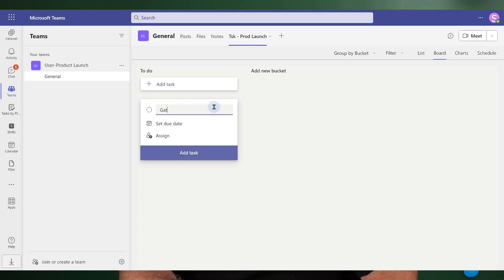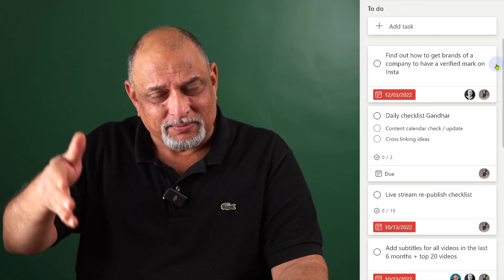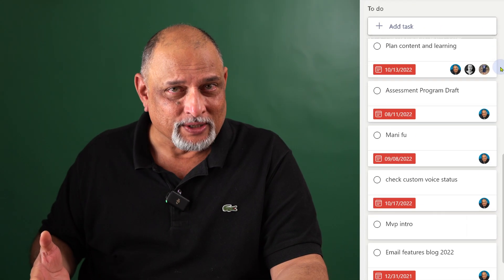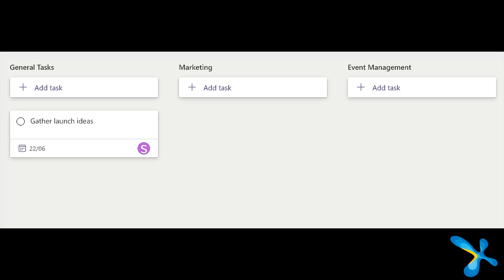Now that you understand that, let's see inside Planner. Planner is a task list, so the simplest method is just keep adding tasks. But the first thing people usually do is add a task, put a deadline, and assign it to people. When you add more tasks, it becomes a flat list — again confusing. So it's a good idea to categorize them. By default the category is called 'To Do,' but you should change it, rename it, and add more categories — they are also called buckets. You decide how many buckets you want.